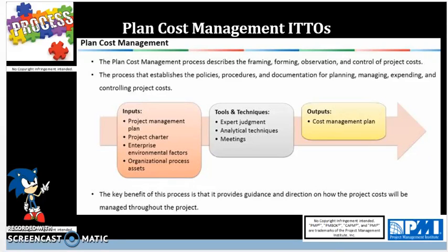The other form of financial techniques in cost planning is ROI, return on investment. Basically, how much money you put in and how much you're getting out. So the numerator is how much money you're going to get returned, divided by how much money you put in as an initial investment in the denominator of the fraction. And the higher the ROI, the better, because you're gaining a return on investment. A positive ROI is what you want. You don't want to lose money. If you are losing money, you need to back away from the project and not even execute it at all if you have a negative ROI or negative NPV.